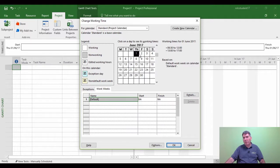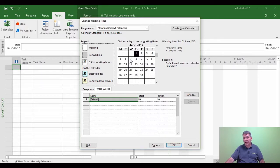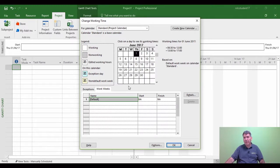Right, so now everything has gone white. So project right now doesn't know when its non-working is. So we've now told it when its working week is. We now need to tell it when it's non-working.